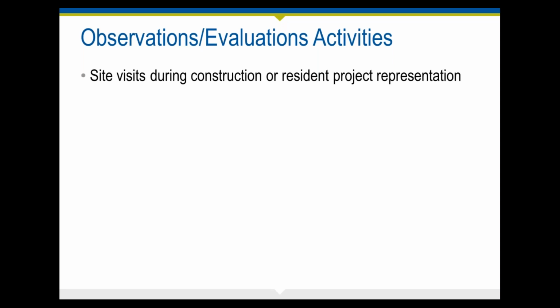But that could be one of the activities that you provide. Communications and documentation about what is going on, what needs to occur. You may need to document that the erosion control measures, for example, have been put in place, and that the permit requirements are being met. If there is a water control issue, or quality control issues that need to be in place, that may need to be documented and communicated with the various parties that are involved.